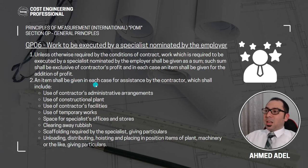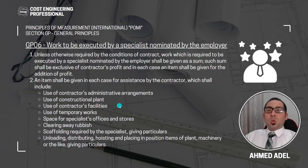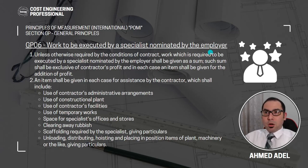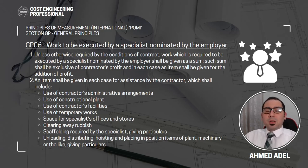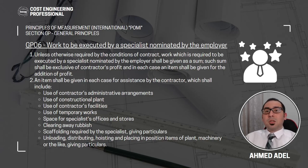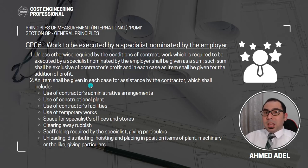An item shall be given in each case for assistance by the contractor. In case some work is to be executed by someone nominated by the employer, we have to keep one item for these works and another item alongside it. You have seen provisional sums in BOQs — they keep the provisional sum in one line item and add another item for contractor attendance, overheads, and profit. We keep one item for the work to be executed by a specialist and another item for the assistance required by the contractor.